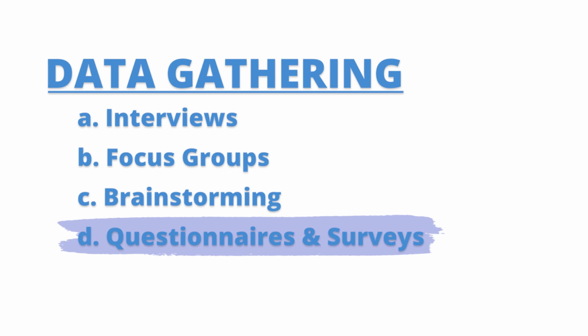So if you're using the data gathering technique and you're using any of the methods here, this is what you'll do. Let's assume you've decided that, you know what, I'm going to use the questionnaire and survey method to collect the requirements. What this means is that you have a list of questions, okay? You put them in a document and then you send it out to potential customers or existing customers, as well as any key stakeholder on the project. That is anyone who the project can affect or who can affect the project. Anyone who benefits from the project or who will not benefit from the project, just identify all your stakeholders and you send them this questionnaire.